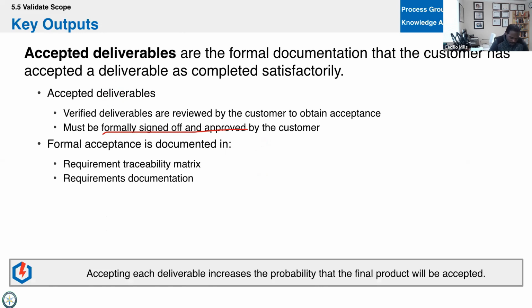And you can document this in your traceability matrix. The exam will usually call out the traceability matrix. It may be the documentation, but on the exam, the traceability matrix is usually called out for three things. It's usually called out for the fact that we want to trace some requirement back to an owner or source. We want to trace some requirement back to acceptance criteria. We want to trace some requirement back to business value. All right. It's not the only ways, but those are the three main ways that the traceability matrix is called out on the exam.